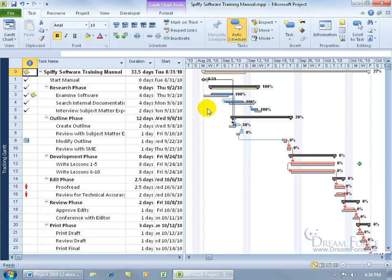Below the task bars, you have these gray bars. Those are the baselines, so you can quickly, over in the chart, view whether you're ahead of schedule or behind. And for this task, you can see that the baseline started over here, that gray bar, and you can see we slipped a couple of days.